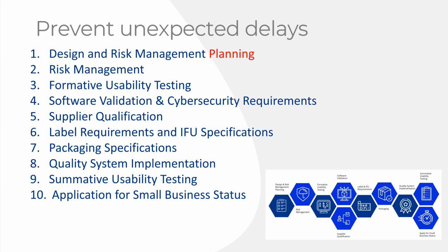Supplier qualification. I can't tell you how many companies I work with that build all their prototypes for testing from one vendor, and then they switch to another vendor, and they think, oh, well, it's the same specs, but the new supplier used a different process, so that changes the biocompatibility of that component because it's a different manufacturing process, so they have to repeat their biocompatibility.